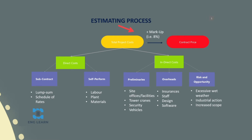We'll then combine all these costs to get our total project cost, apply a markup to this cost to cover the business profit margin and corporate overheads, review our estimate, fill out the client pricing schedule and then submit it to the client.